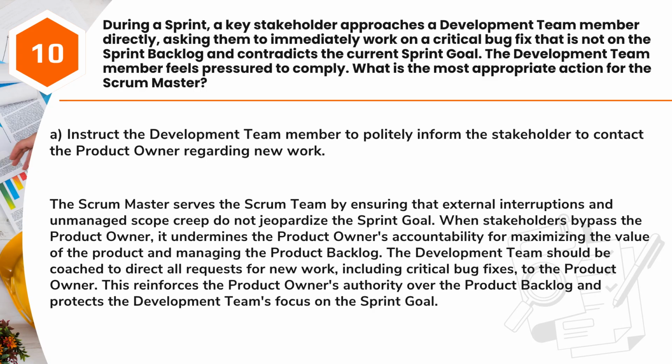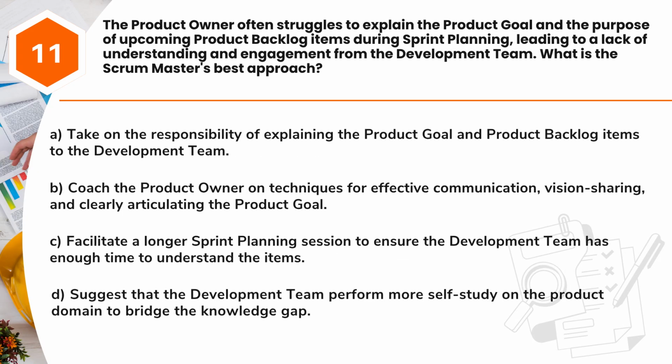The development team should be coached to direct all requests for new work, including critical bug fixes, to the product owner. This reinforces the product owner's authority over the product backlog and protects the development team's focus on the sprint goal. Question 11.